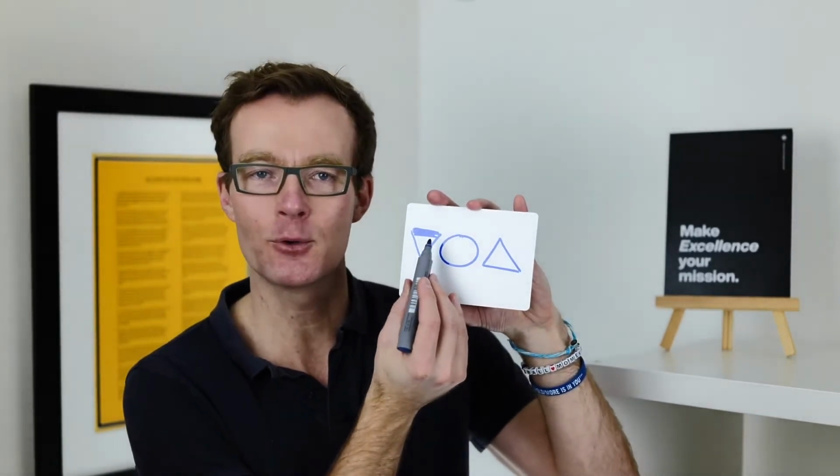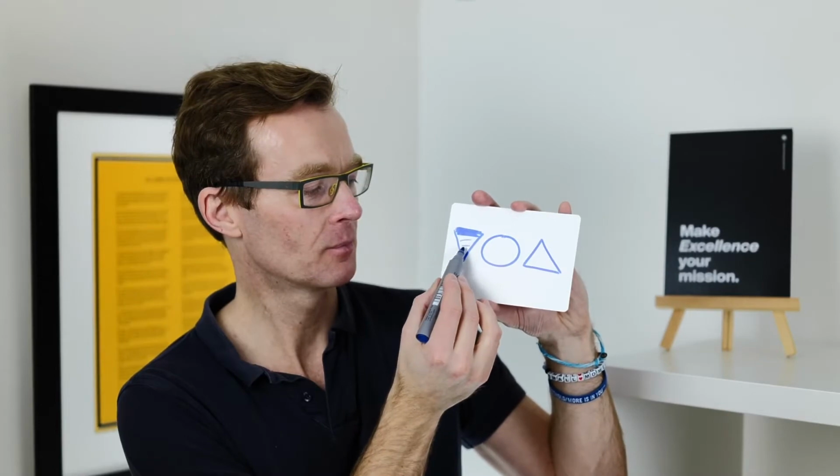So at the beginning, you start out with a simple idea or some grandiose idea, and it kind of starts off up here. And what happens is you then whittle that idea down through various phases until you actually agree on the scope, the budget, and all the resources required for that project, and you've got everybody on side before you sign it off. In print speak, they'll call it a project initiation document, or some kind of scoping document. But everybody's agreed up front what that project will look like and what it will deliver.